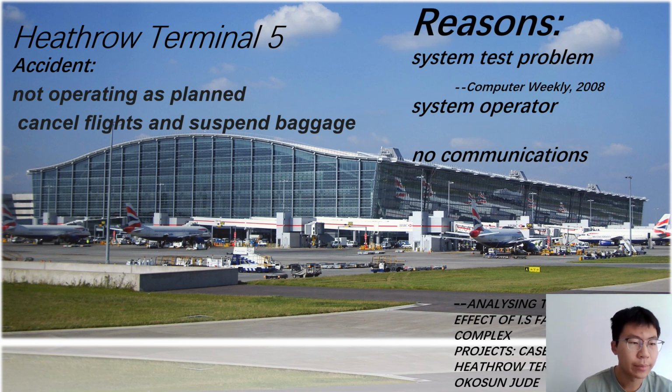For the second reason, as for the baggage system, staff also did not know when and how to unload the baggage properly, which caused the system to overload and clog. It was only after about 2 months that Willie Walsh released a statement stating the cause of faults on the baggage system in the early days.